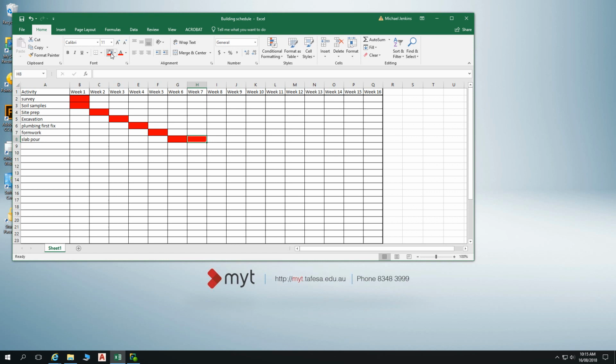Once we've given that bit of time to cure, what are we doing next? Walls getting put up. There'll be all your site deliveries, all your timber delivered, all your bricks delivered, ready to start the walls. That can be affected by the particular site. Some sites can have all that stuff delivered at one time. Other sites are a bit tight, and that differs between jobs. But yeah, so we get delivery of materials, and then we get our walls up.